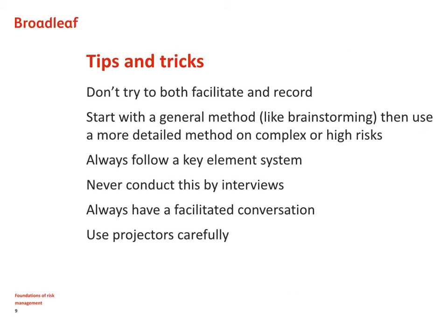So what are our practical tips and tricks for discovering risks? First of all, and I think we've all learnt this the hard way, you shouldn't try and facilitate and record the discussion at the same time. It's actually almost impossible to control the conversation, to steer it in the right direction, and at the same time concentrate on recording what is being discussed.